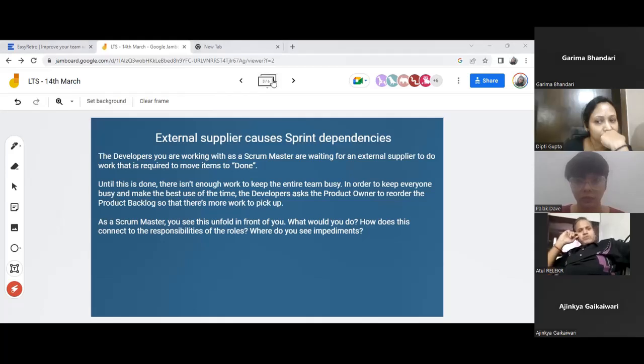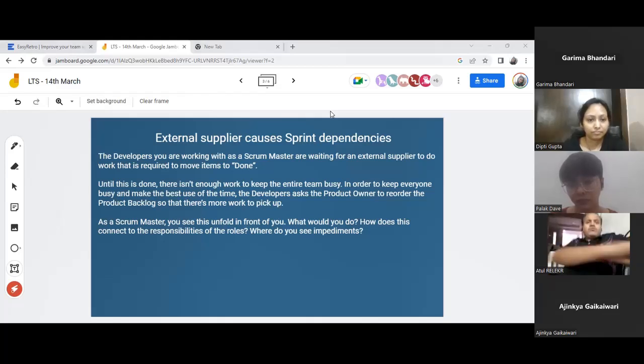Maybe during sprint planning we have those meetings where the team always takes a stretch goal, right? One or two stories more they commit to, saying probably this will be our stretch goal, and we'll try to see whether we can fit those and deliver those as a part of this increment. So that approach might also be something the Scrum Master and product owner should encourage more during the sprint planning meetings.